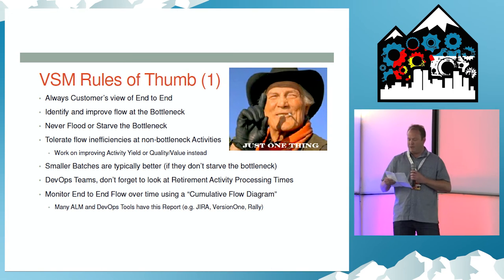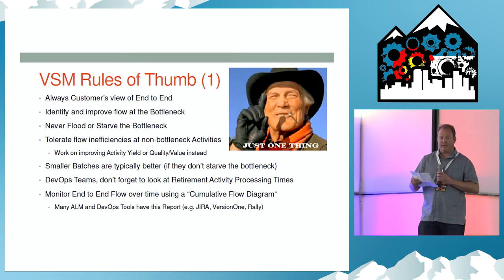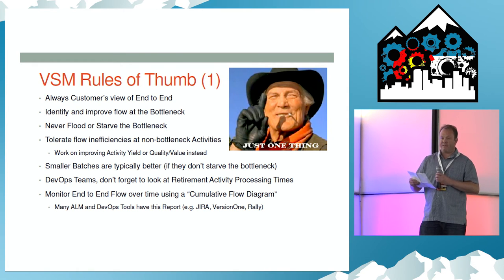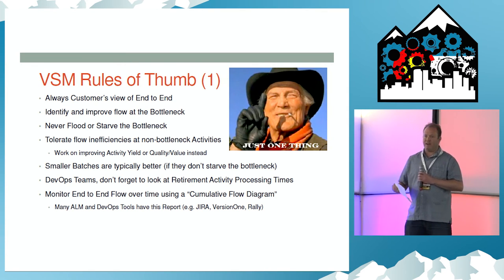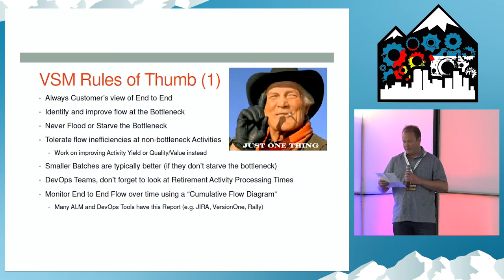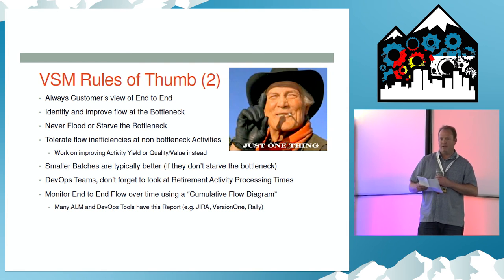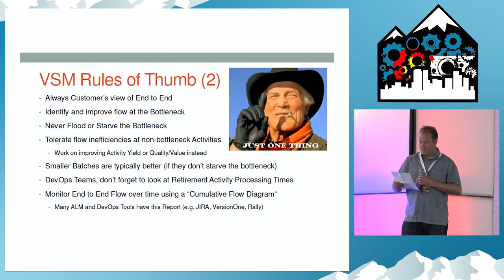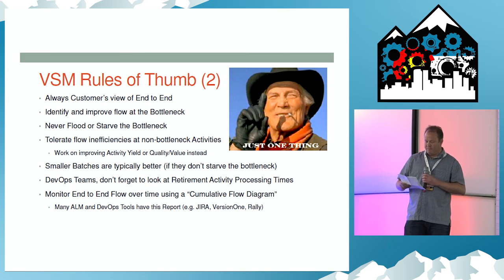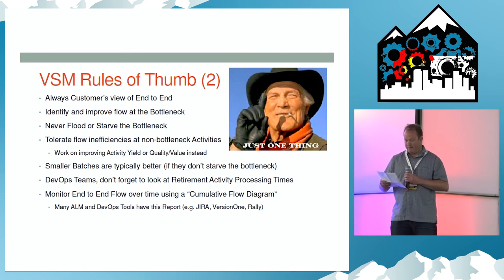To recap: it's always the customer's view of end-to-end. You should identify and improve flow at the bottleneck, never flood or starve the bottleneck, and tolerate any flow inefficiencies outside the bottleneck. Smaller batches are generally better if they don't starve the bottleneck. For DevOps teams, don't forget to look at your retirement cycle times because that's going to affect your next iteration. Finally, use a tool called a cumulative flow diagram to monitor your flow over time.